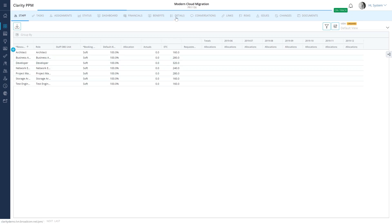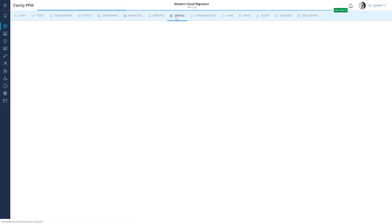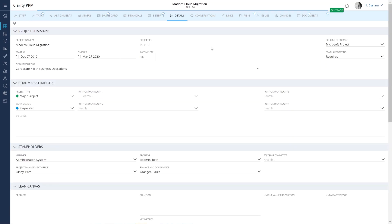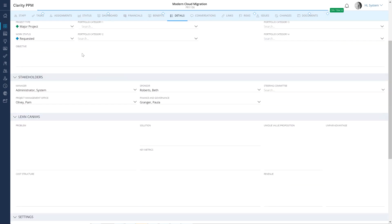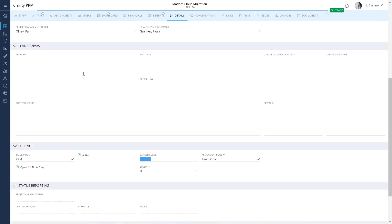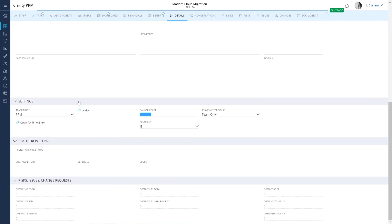Let's start with the details module. We typically begin by entering the start and end date of the project. We can also ensure the project is active and it is open for time entry. If a project is not open for time entry, resources will not be able to submit actual time against the tasks in the project.